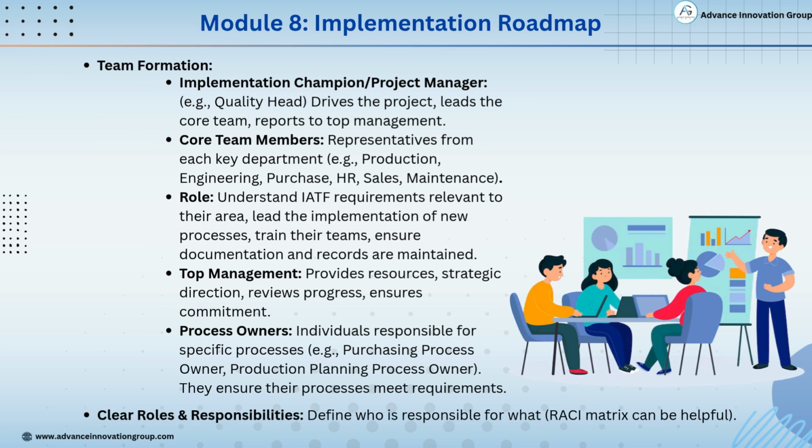Let's now focus on the team formation part of IATF implementation. First, we need an implementation champion or project manager, often someone like the quality head. This person leads the project, guides the core team and reports directly to top management. The core team members are selected from key departments like production, engineering, purchase, HR, sales, and maintenance. These people bring departmental expertise into the implementation process.